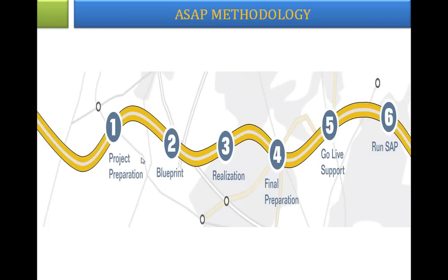In project preparation, what is going to be our job role? What do we do in our project preparation? What kind of documentation will be maintained? The project preparation is going to be the first phase, where there is an interaction between the client and the implementation partner. The client is going to provide us business challenges. We understand it and we propose a solution for it. What is going to be the estimated cost? What should be the hardware use? Or how many consultants will be working over here? All those things, negotiations, everything will be carried out in our project preparation.